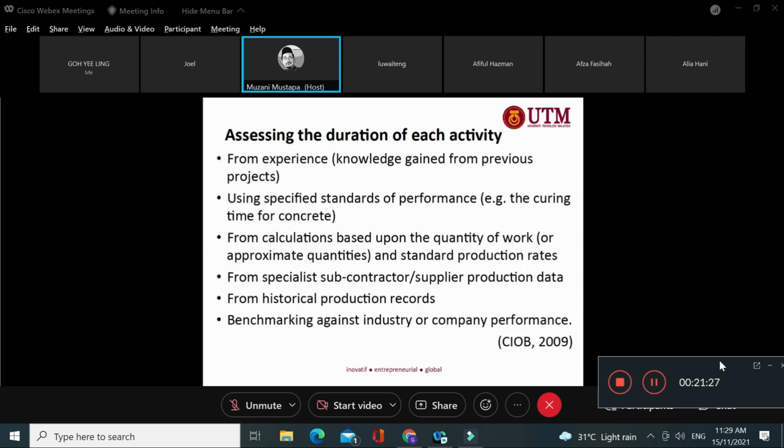For example, in terms of wet construction, the concreting work and so on, I suggest that if you want it fast, I ask you to do a steel structure, for example. So the price will be high. So this is the relationship between time, cost and quality, right?